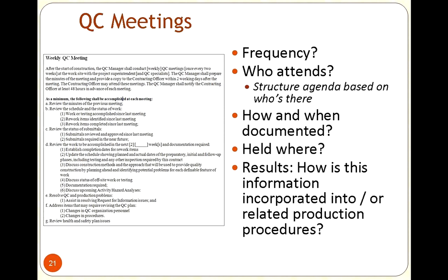And we actually would put in language such as, we're going to update the schedule per this. We're going to resolve items per that. We're going to address the items through this method. We're going to review health and safety plan issues. That was always a big thing we were making sure of, is making sure people were safe. So we always included that in the agenda to review if there were any possible effects from a health and safety standpoint.